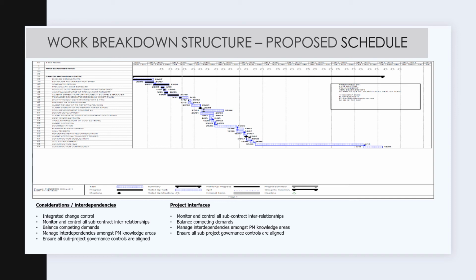support streamlined information sharing. Historical information from previous similar projects should also be considered and referenced to prepare and finalise the schedule. There's a requirement to determine the scope, and I'll need to establish a project definition report and review historical examples to establish baselines. Need the monitoring and reporting tools, including meetings, and develop the schedule and the schedule management plan, and identify any synergies that can provide efficiencies.